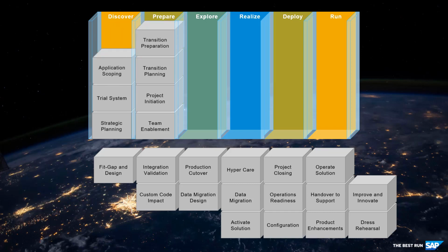The planning workshops often reveal preparation activities which have to be done before the Explore phase starts. One example is the customer vendor integration in case of a system conversion. In addition, you should clean up custom code which is not in use and clean up and archive business data to reduce the size of your productive system. This will reduce hardware requirements of your new SAP HANA database and reduce business downtime during conversion. The prepare phase ends with the first quality gate to ensure proper project preparation.